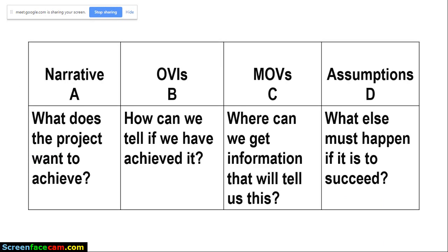Okay. In your reporting templates, you are going to have a column which will be baseline. Then you are going to put the numbers as collected at a point when you did your baseline. Then here you are going to put in now the actual status. What's the status of that indicator after 3 months? Then from there, you do a comparison. This indicator was 14.2, but now it's at 7%. Then you know as a project that we are moving in the right direction.